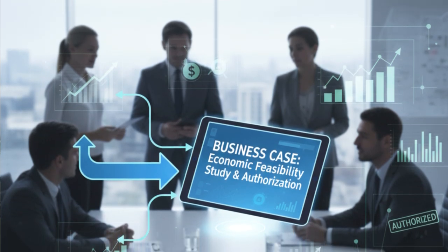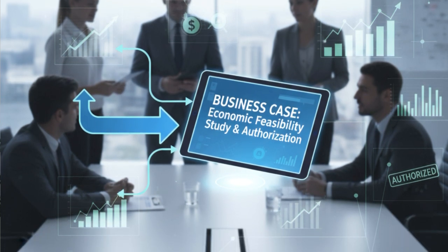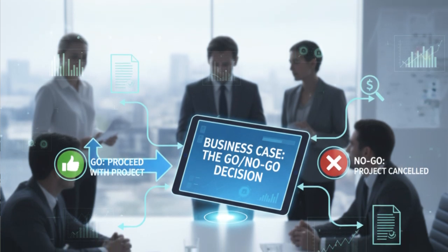But the business case is a documented economic feasibility study used to establish the viability and the benefit of a selected project. It is what serves as the basis for authorization for further management directives. It is in this business case that you establish if the envisaged project is going to be profitable, or not going to be profitable, useful or not useful, and based on that, you submit to management and a decision has to be taken. The business case is the project business document, and it is at this point that the management takes what we call a go or no go decision.